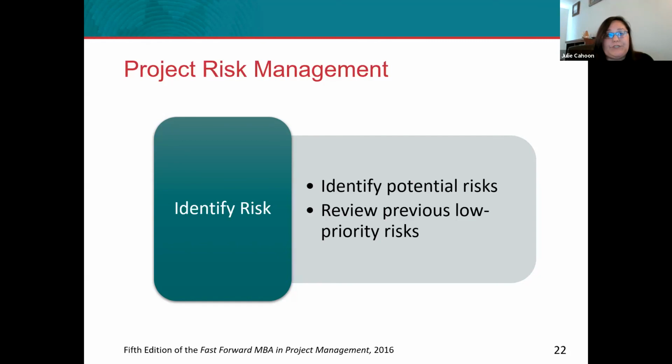And so a risk register is a document that you use that is updated, like a simple Word document with a table where you list your identified risk.